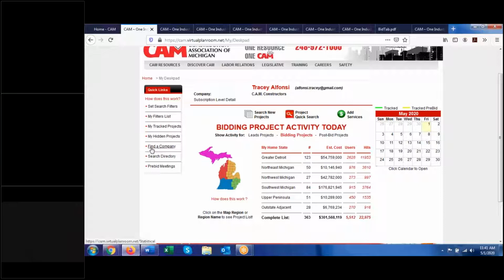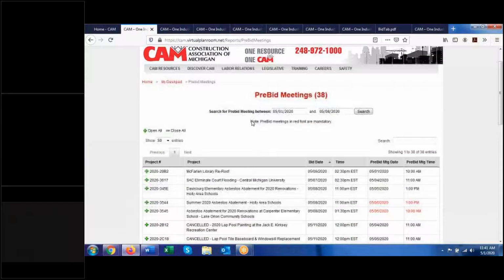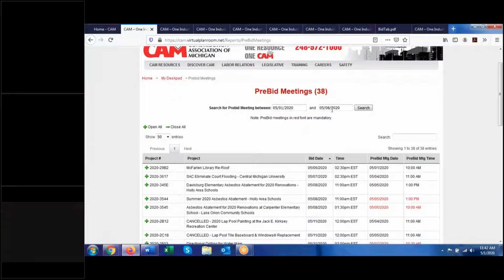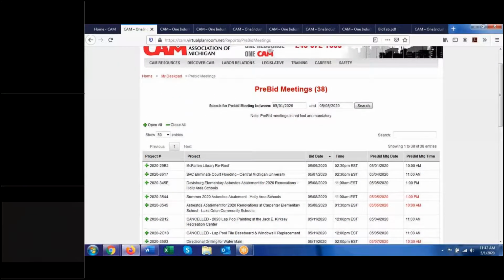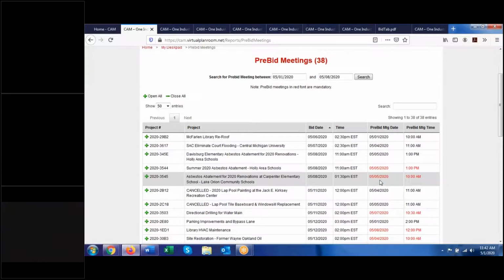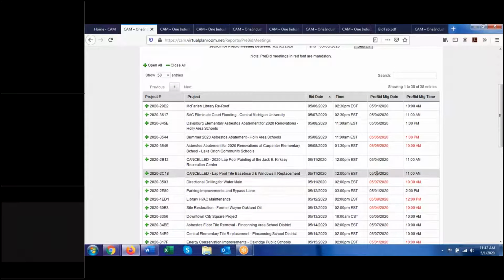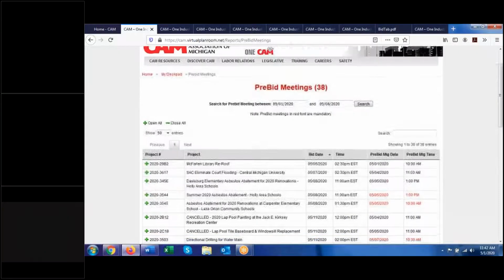If you have specific information on a company like a phone number or an email or a company name, you can find it here. And if you're just looking for painting contractors in the Upper Peninsula, you can use the search directory function. And then pre-bid meetings is the last thing I'll show you. This shows you all of the upcoming pre-bid meetings between this date range. If it's in red, that means it is a mandatory pre-bid meeting. If it's not in red, then that means it's not mandatory.